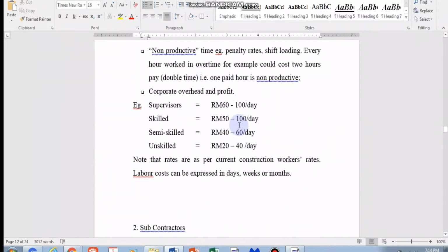And then also management: supervision teams and above, it's the same thing. There will be meal allowances, phone allowances, hostel allowances, site allowances, car allowances, petrol allowances, all of which will be part and parcel of that unit that you are looking at. So don't just say you're paying $2,000 for the engineer, when actually all these other expenses add up and you're actually paying $3,000 a month. You have to be very careful, and if there are any other claims coming in, that is all part and parcel of the cost. So you must calculate your component of cost or the rate very carefully.